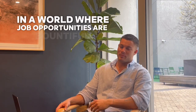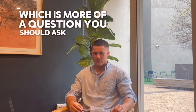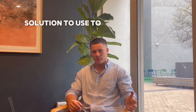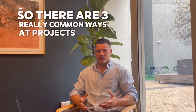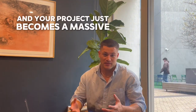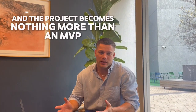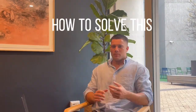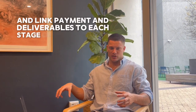So the third point, which is more of a question you should ask yourself before choosing a solution to use to build your app, is what happens if it all goes wrong? So there are 3 really common ways app projects could go wrong. The budget could get blown and your project just becomes a massive money pit. Your timescales go completely out of the window and the project becomes nothing more than an MVP and never gets fully finished. Break the project down and link payment and deliverables to each stage of your project.